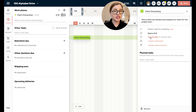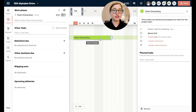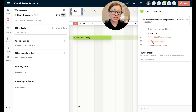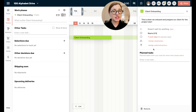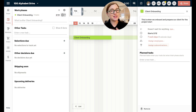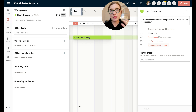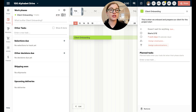If you're overlapping on the weekends it's naturally going to skip those days, so you want to make sure you have your working days set up. If I drag this bar over the weekend it's not going to count those weekend days. You can assign employees to this phase if you'd like — someone on your team can be responsible for this. You can also assign subcontractors. In something like client onboarding that's going to be an internal phase, but eventually for things like plumbing rough-in you can assign that to a subcontractor.